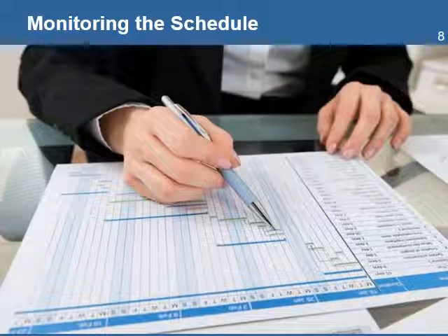Monitoring should be done on a regular basis to help identify variances with the planned schedule. For projects that have a critical schedule constraint, the monitoring should be as frequent as possible to detect variances and implement changes to get the project back on track. The results of monitoring the schedule will lead to decisions to make changes in the schedule. The changes can also result in changes to the scope or the budget. All changes should be analyzed before they are approved.